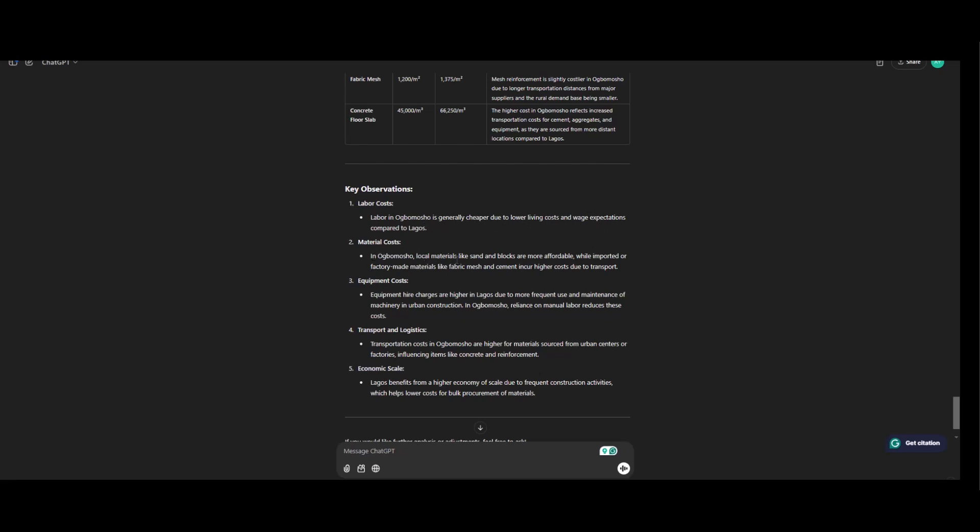More imported or factory made materials like fabric mesh and cement incur higher cost due to transportation. Equipment cost. Equipment hire charges are higher in Lagos due to more frequent use and maintenance of machinery in urban construction.